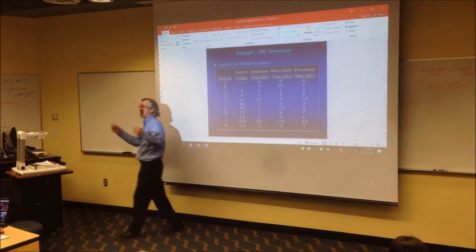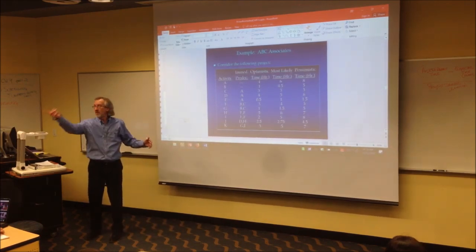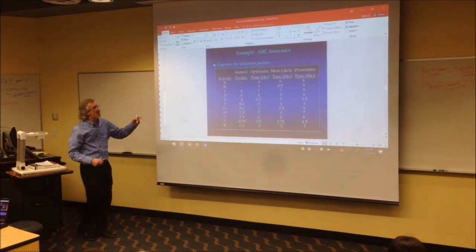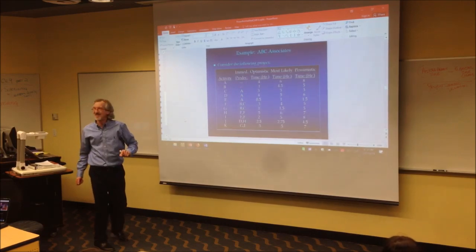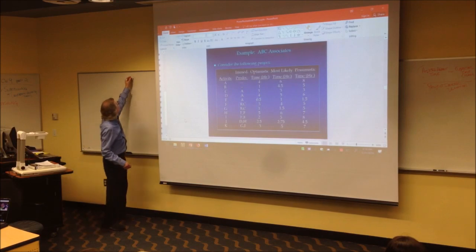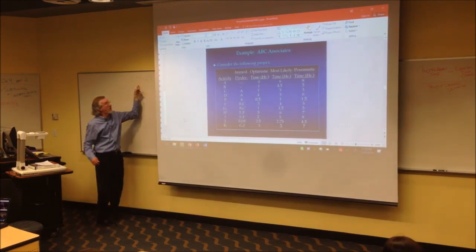Let's calculate one of these. Pick an activity other than A or B or C, pick any of them. H, let's go with H. The formula, back a few slides, says you take the most likely time, which in this case is a 6, and multiply it times 4. So in this case, that'd be 24.